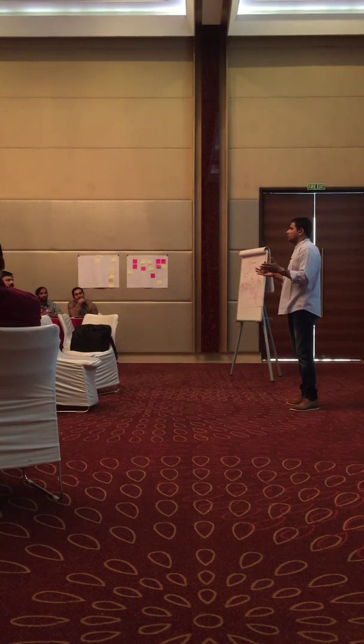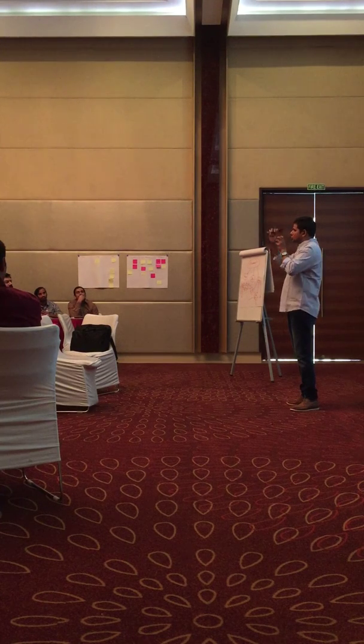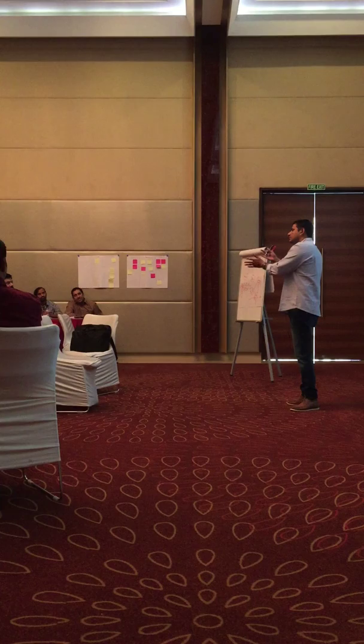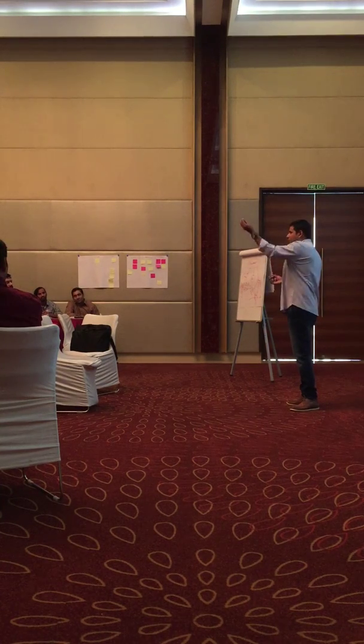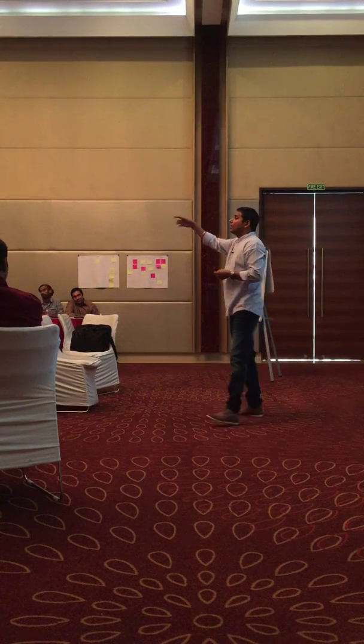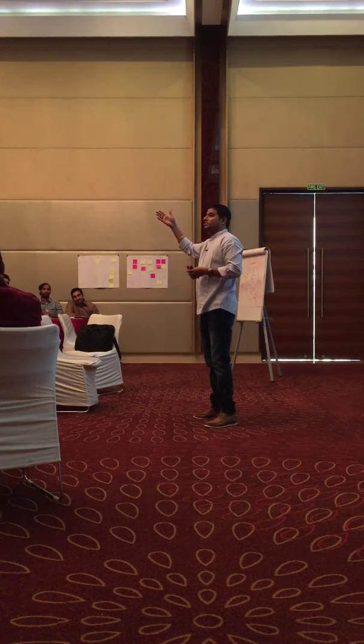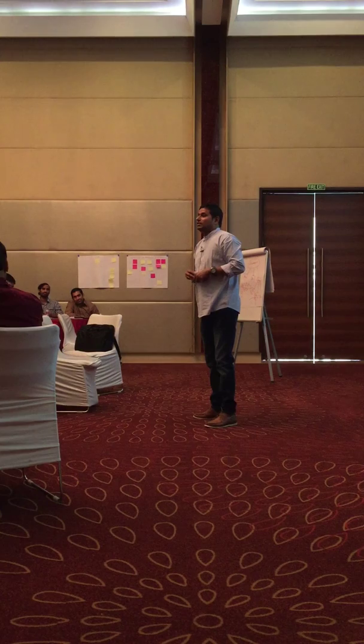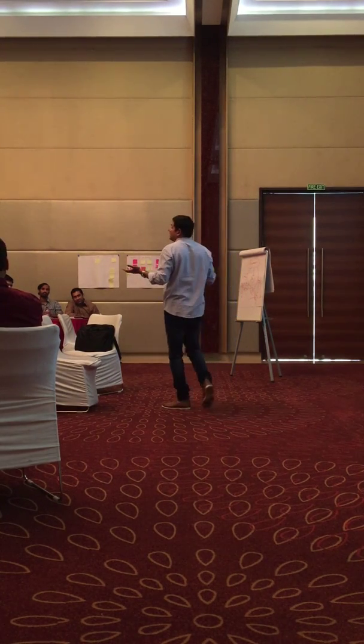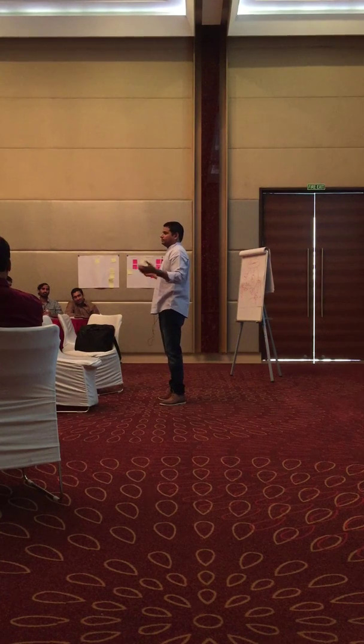You are doing waterfall. Right? Ideally, you should pick up one or two stories from the order of priority. You do analysis, design, development, complete them in 1 or 2 days or 2 to 3 days. Then pick up the next story. Then you will get more clarity in terms of what principle number 7 says, which is related to metrics. Working software is a primary measure of progress. That's it. Nothing else. Right?